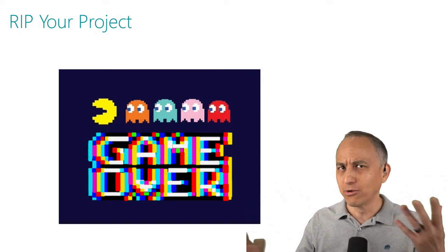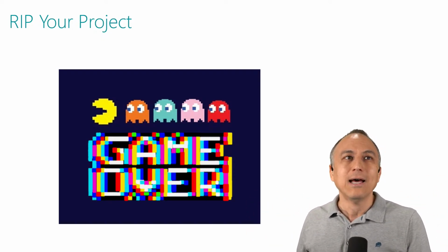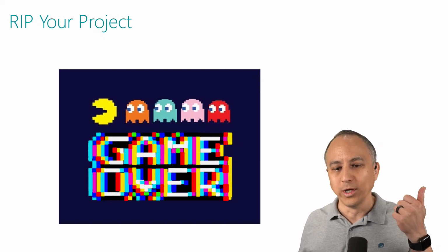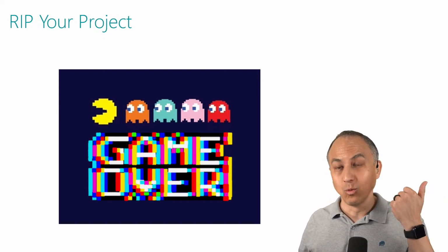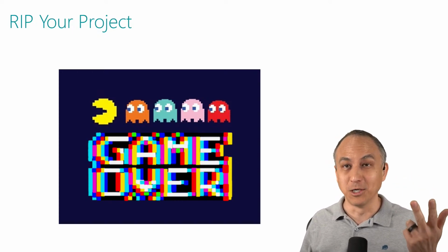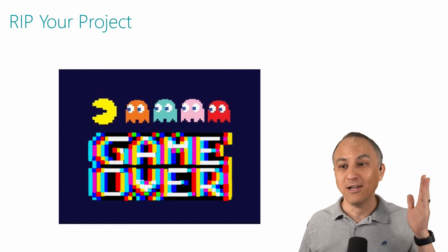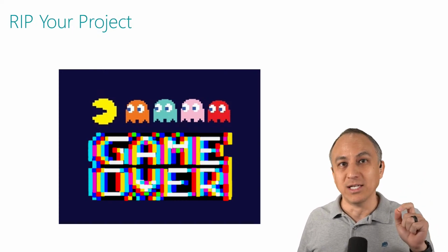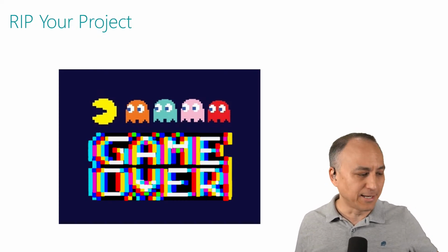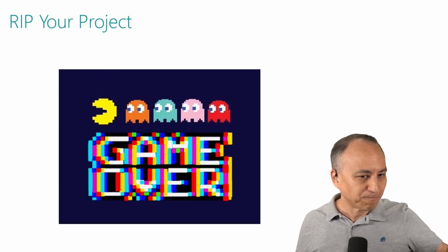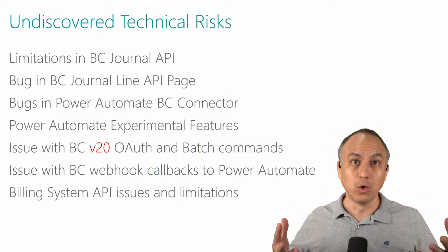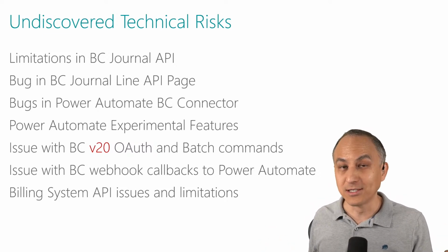just what we were discussing, what's going through our heads, what felt kind of in the ballpark, and we would have been in trouble. We would have gone over budget, we would not have been able to deliver, and we would have had a guaranteed dissatisfied customer, period. No question about it. And we would not have been able to deliver this even close to 10 hours, based on my experience. Why is that, you might ask. Well, it is due to unknown or undiscovered technical risks.